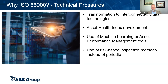I've seen studies where people were trying to inspect all of their piping in a five-year period. With a risk-based approach, I've seen them break it down — higher-risk areas inspected every five years, lower-risk areas extended to 10 or even 15 years between inspections — which actually allows them to get all of it done without greatly increasing the cost.